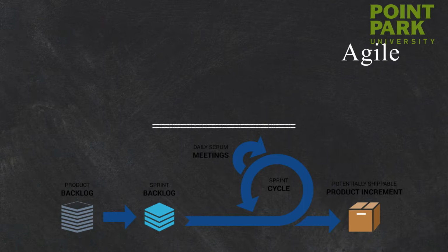So what is everything they want? Now you have to take all their notes, figure out what they want, and create a backlog, which is individual tasks of what is going to happen. Create a button, have the button create an action event. We need to create a feature or an API call or a database call. We need to do this. We need to do that. That happens in the backlog.